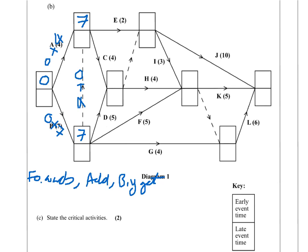Now I can say zero plus four is four, or seven plus, and a dummy activity has a weight of zero. So that would be seven plus zero. I'm going forwards, I'm adding and taking the biggest. Zero plus four, or seven plus zero, the biggest there is the seven. Now we select the next box. The arrows going into it, I'm either going to have the seven plus four, or I'm going to have seven plus five. Seven plus five. I'm going forwards, so I take the biggest, seven plus five is clearly bigger, and that has a time of twelve.